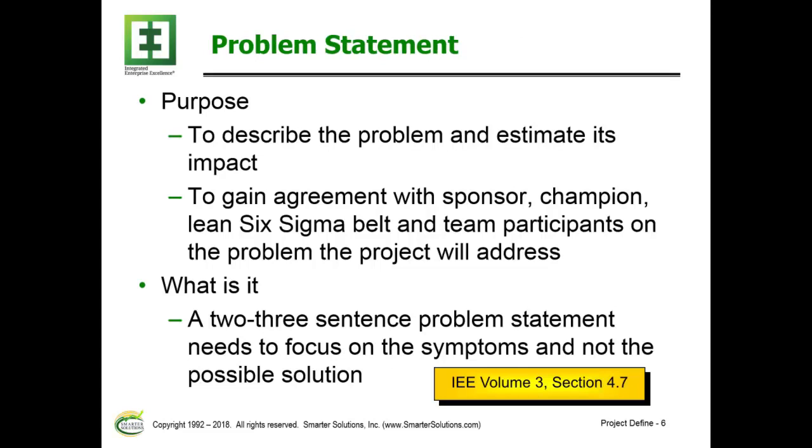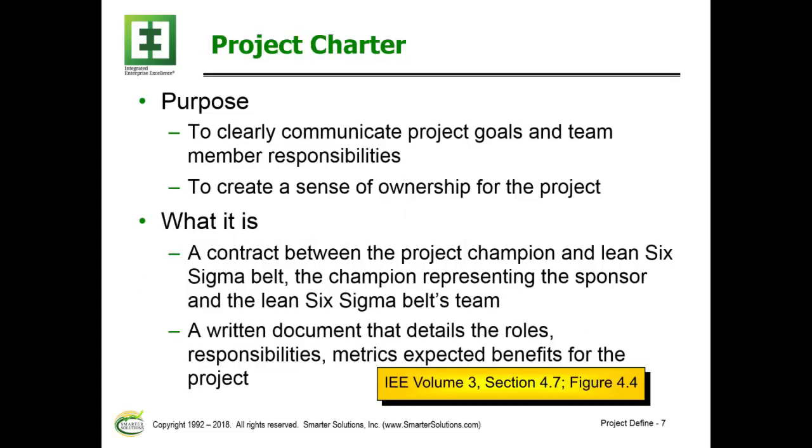Now the problem statement is to describe what's to actually be addressed through the execution of the DMAIC projects. It's supposed to be a two to three sentence problem statement. It needs to give focus on the symptoms and not the possible solutions.